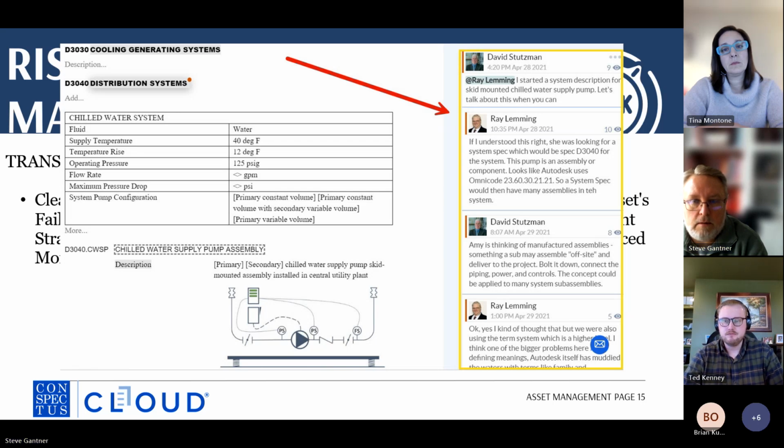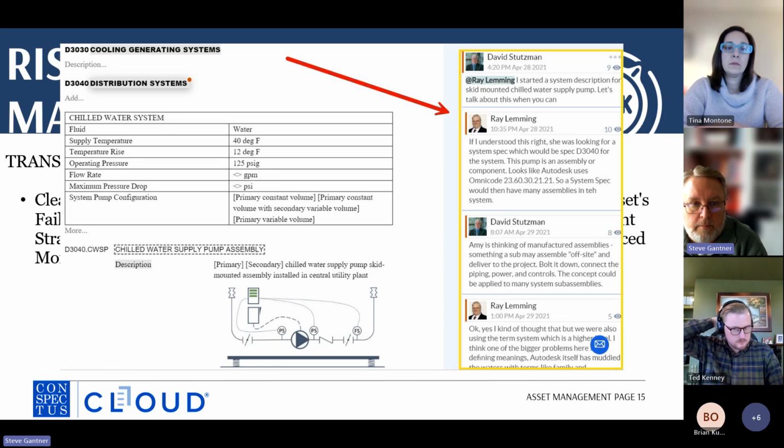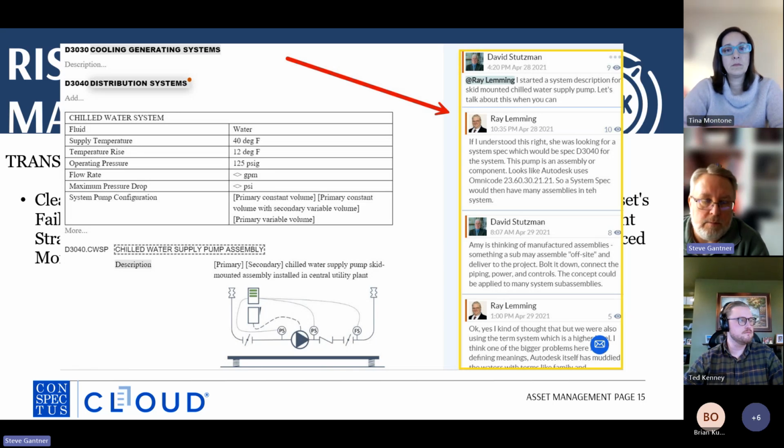They in turn hired their curtain wall manufacturer. And we also had the mechanical engineer, structural engineer, a quality control person from the architect, and the project manager from the owner involved. And by going through this process, it took us a little longer to write a singular spec section. But in the end, what we ended up with was a curtain wall that is finished, and there were no change orders and no RFIs on that curtain wall system because everyone participated in the design, and before anything was purchased, everyone bought off on it. So that's one example of how we can mitigate risk.